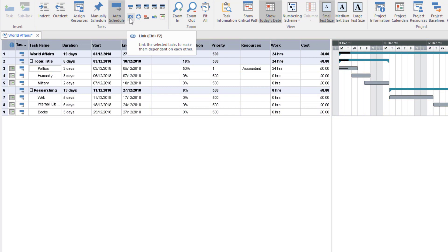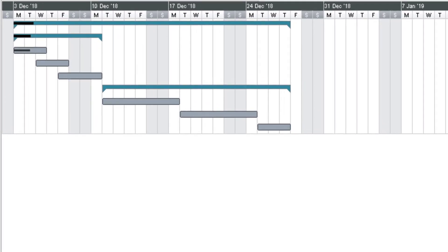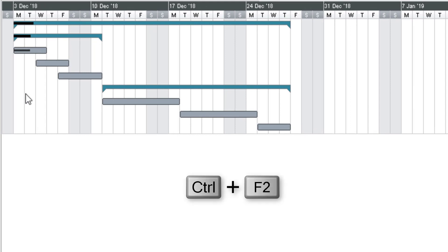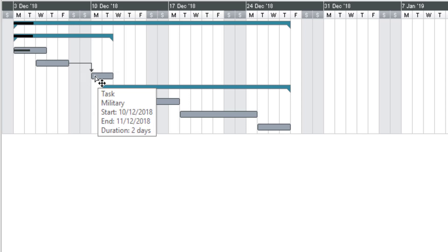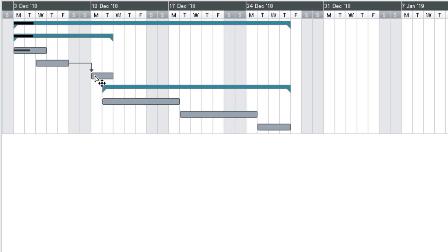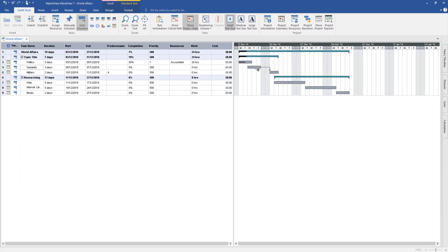Underneath is linking. Remember what I said about linking one task that needs to be dependent on another task finishing. You can link with Ctrl+F2, or what I like to do is click into a task, hold the left button, and drag it onto your next task. When you click on it, it moves it along — it pushes it over the weekend or to the next working day. So it's dependent on this task finishing before the next one can start, otherwise your tasks overlap and end up in a mess. Set the first task to 100% finished and then move on to the next.